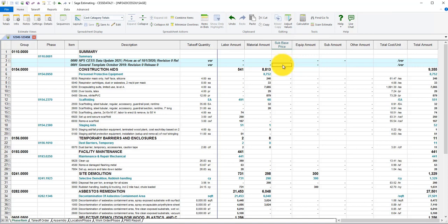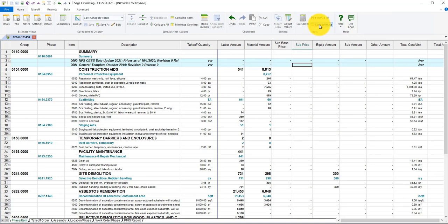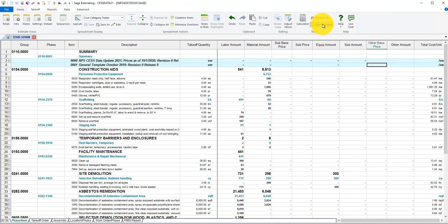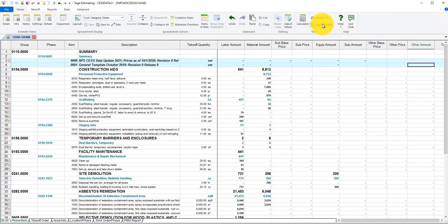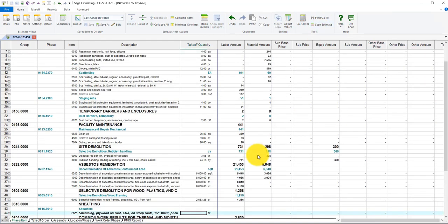We're showing sub here, so it says, well, if they're showing the sub column, there should be a sub amount. And it's just going to motor through and find every incomplete entry it possibly can find. Notice we know they're incomplete because they've got that nice blue background. And because there's no crossfoot total, it's going to consider these items incomplete.